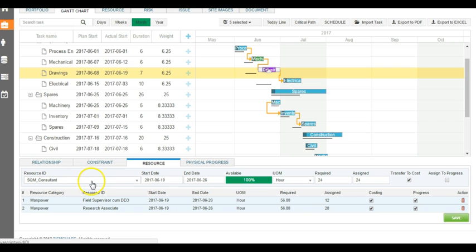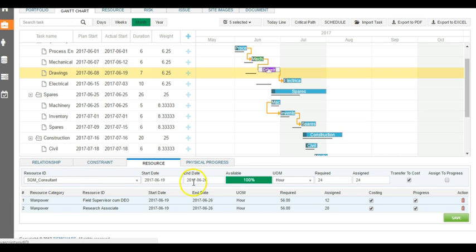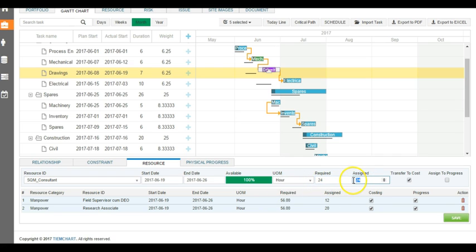When we select a resource ID, it gives you what are the available hours during these days for this particular consultant or resource, and we can allocate the required 24 hours and how much we want to assign for this resource.